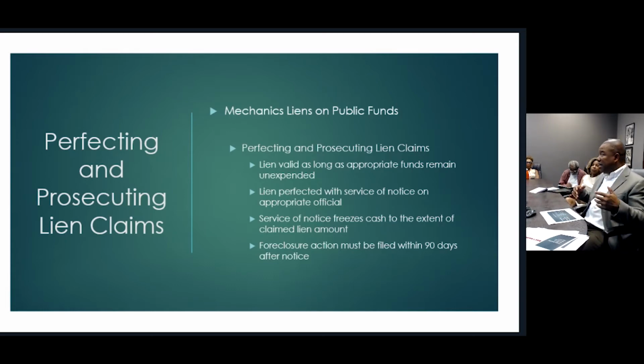In that case, it was the Public Building Commission who was the owner because they've been given funds by the CPS. They now own those funds and they now build a school. So your failure to provide notice to the appropriate city official could also void your claim. So it's important that you understand and determine who the actual owner is when you file your foreclosure claim.